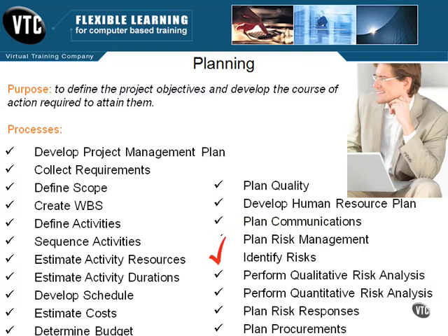The Identify Risks process then generates the list of known risks and also determines the effects that they may have on the project. The characteristics of the risks are also documented. Perform Qualitative Risk Analysis is where the probability and impact of risks are assessed and combined, which will be used to prioritize the risks so that more efficient analysis and action can be taken.